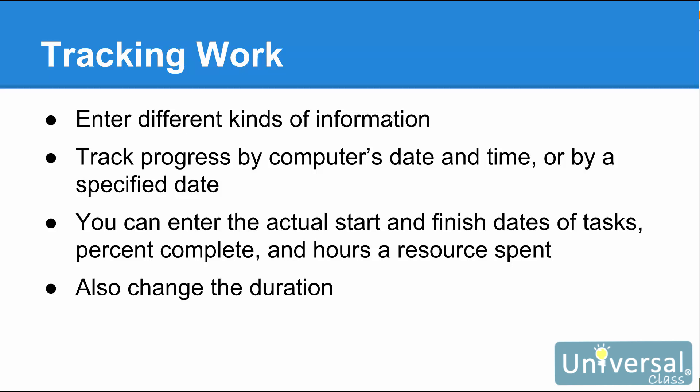In addition, you can enter the actual start and finish dates of tasks, the percent complete as we learned in the last lesson, and the hours a resource spent on a task. If you think a task will take more or less time than originally scheduled, you can change the duration. What's more, you can enter materials and use fixed costs for expenses such as outsourcing fees or shipping costs.